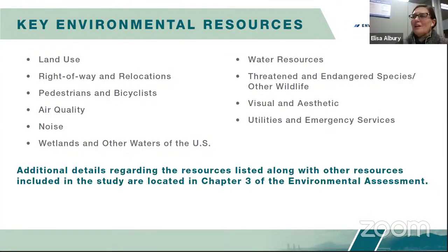Thanks, Ryan. As both Darren and Ryan have talked about, we prepare an environmental assessment to comply with the National Environmental Policy Act, also known as NEPA. As part of NEPA, we are required to look at numerous environmental resources within what we've defined as our study area. Shown on the slide here are some of the resources that we did look at for this area. We've just highlighted them here. And I want to point out that for all of the resources that we've looked at, we consider the impacts associated with them, including positive impacts, or what we would commonly call a benefit. And we look at both the impacts for the no build or the no action alternative, as well as the preferred alternative.